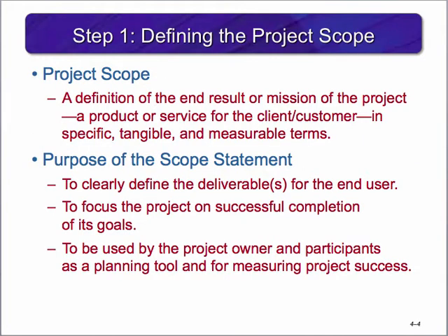The first step is to define the project scope. But what is project scope? It's a detailed description of the end result of the project. It typically includes project objectives, deliverables, milestones, project specifications, technical specifications, and limits and exclusions, all in specific, tangible, and measurable terms. The scope should be developed under the direction of the project manager and client.